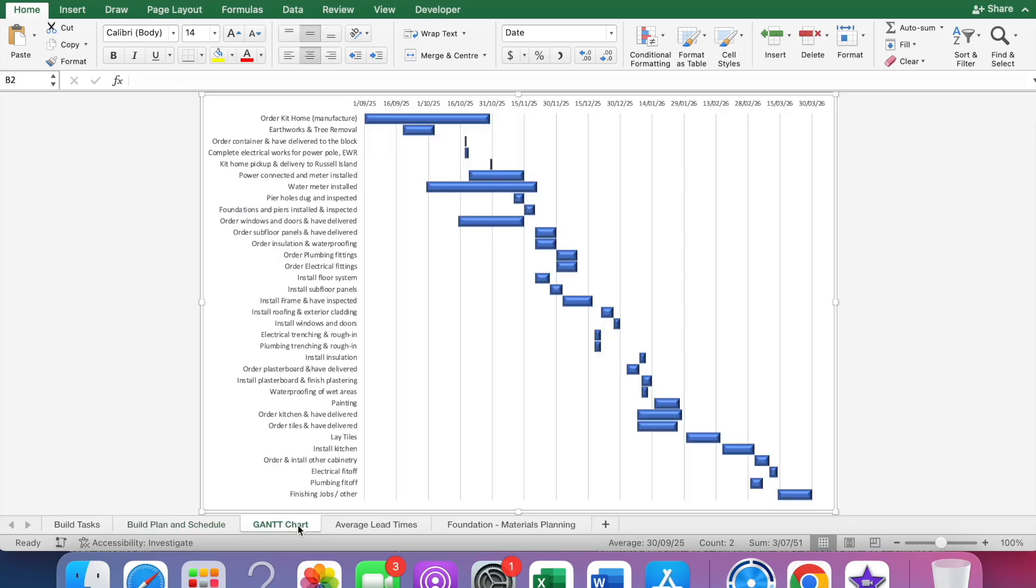If we as owner builders can be well enough planned to foresee what's coming next, I think that would be a huge advantage. We're not experienced in this like normal professional builders are. They know when to get each trade in, they know how long a plumber might take to be available. You might realize if you're not planning properly - oh, I need all my pipes run while the electrician's here and has the trenches open. But then if you tell the plumber on the day can you come here today to lay all my pipes, I bet you they will say no.